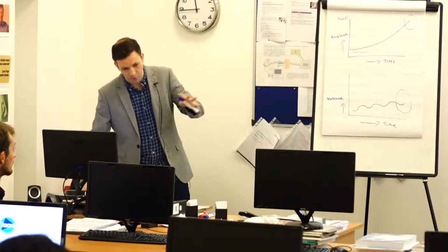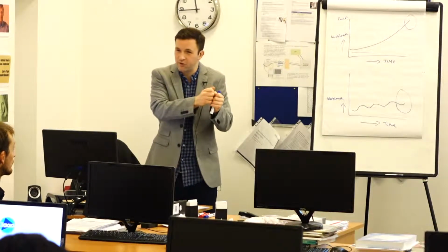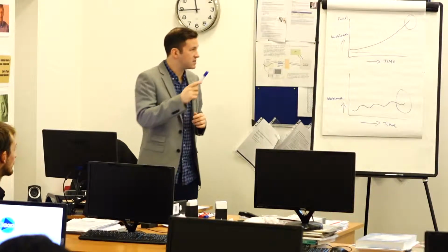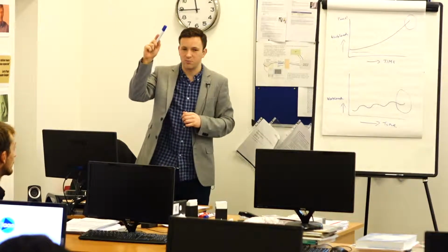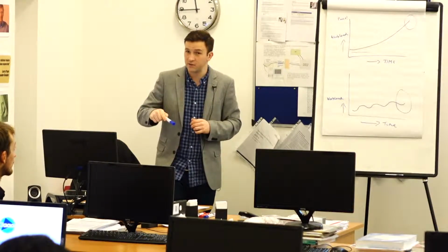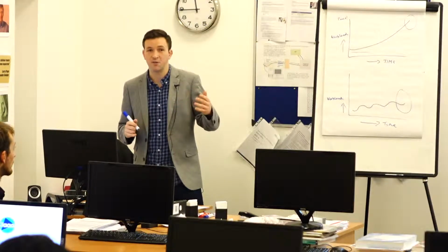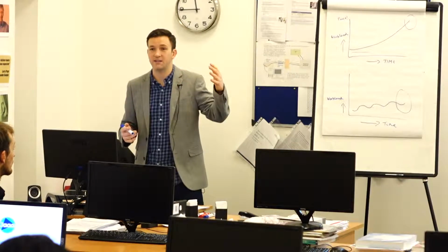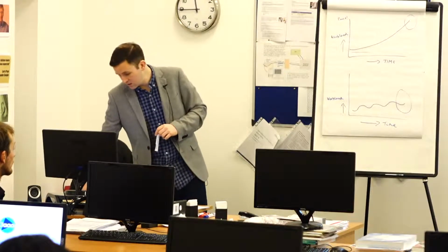And so you sit down and you form all the features into a grid, and from that you can begin to order the backlog. But that's ordering the business value to the client. What we don't have is, if something's of high business value, it could take absolutely ages to develop, in which case it doesn't make sense to do that item first.